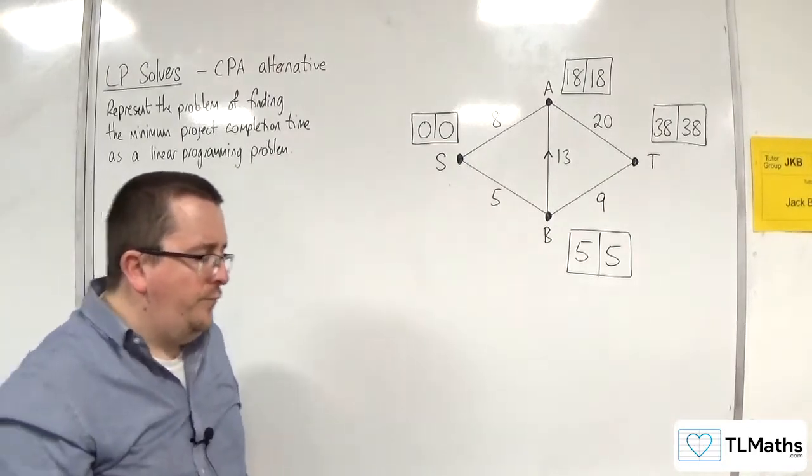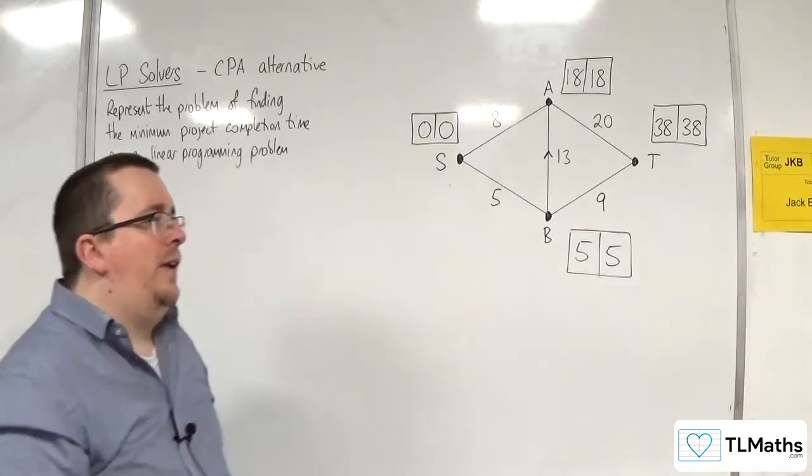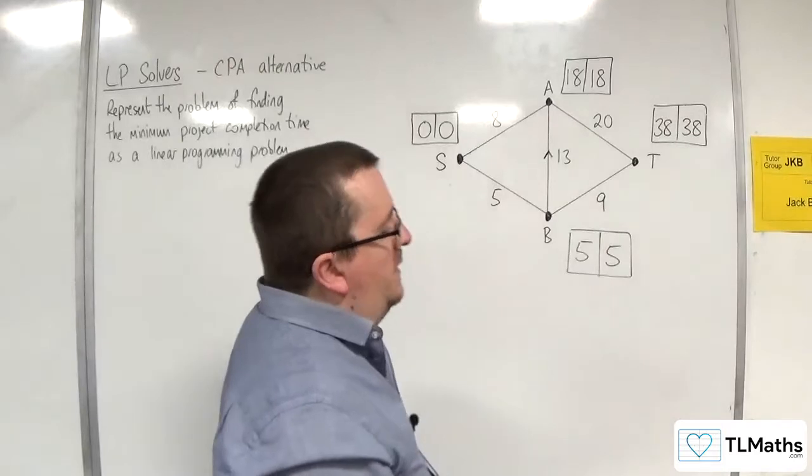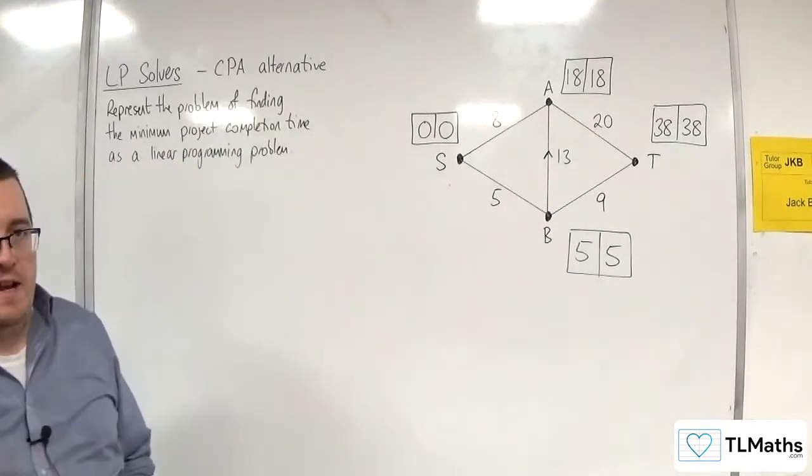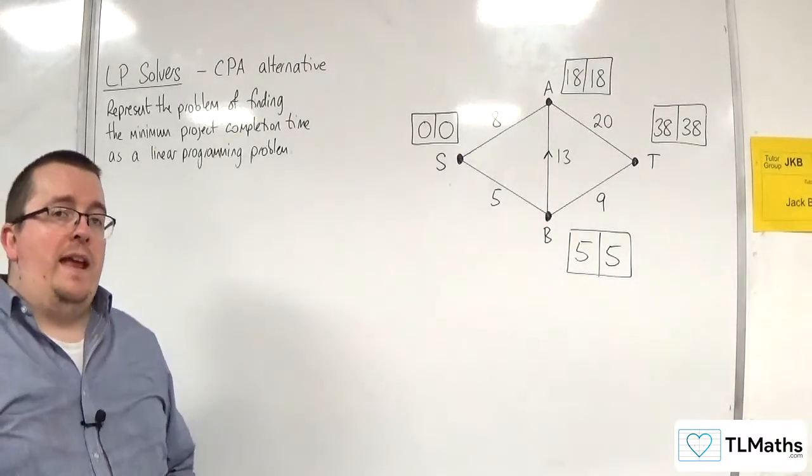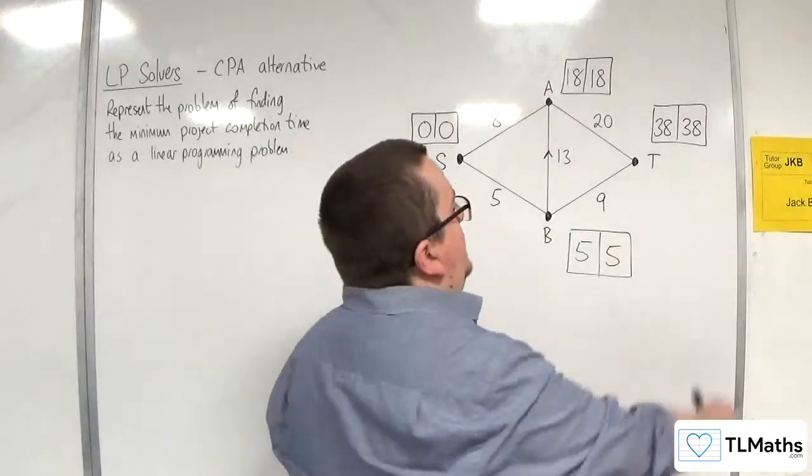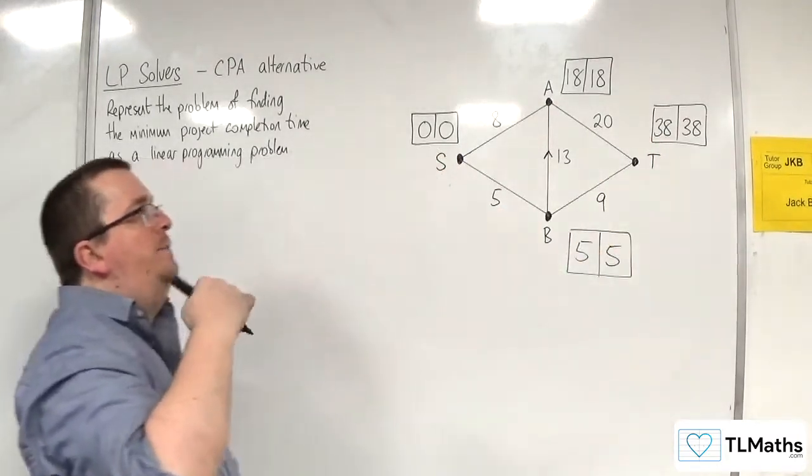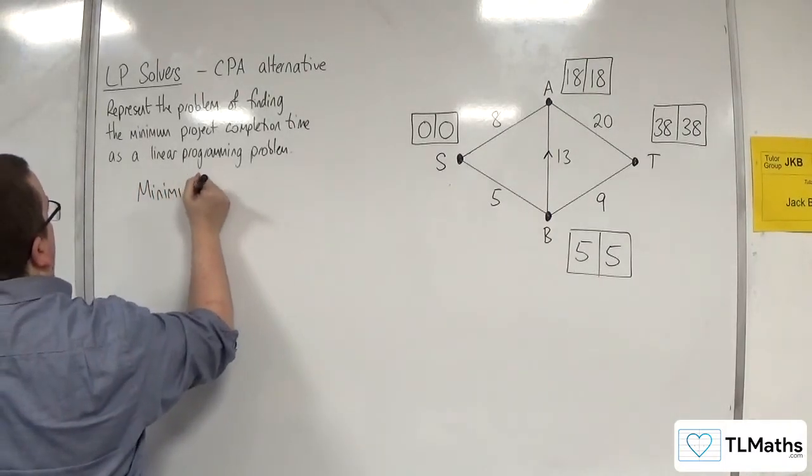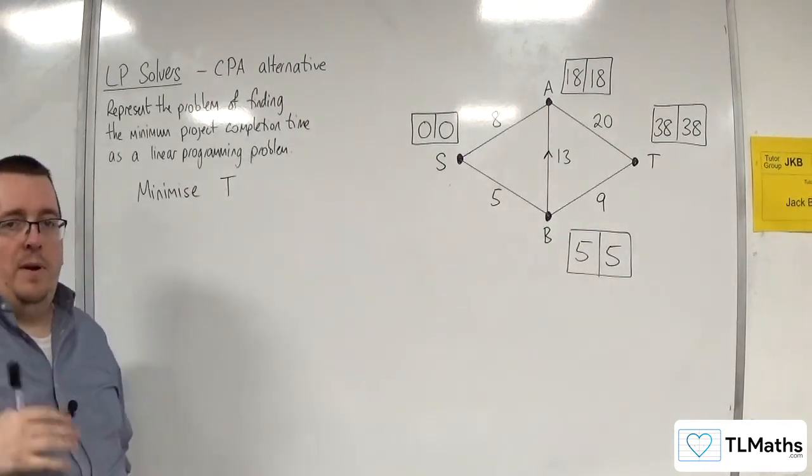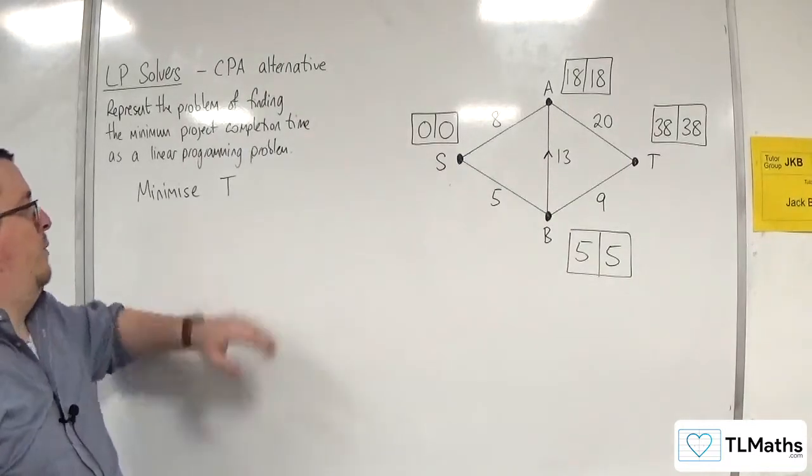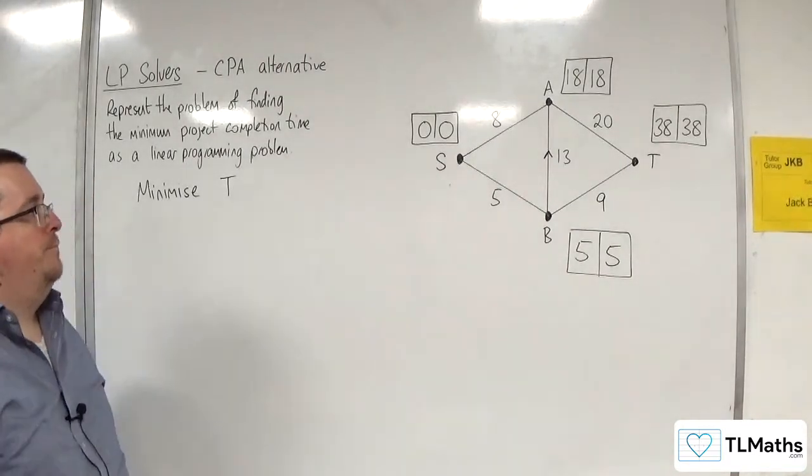So how can we formulate this as a linear programming problem? Well, what we want to do is essentially we want to minimize the value that is at the end vertex. So the end vertex here has a value of 38 that we've just worked out. So we would want to minimize T. Because we want to complete the job in the smallest amount of time, least amount of time. So we want to minimize the value that's at T, at the end value.